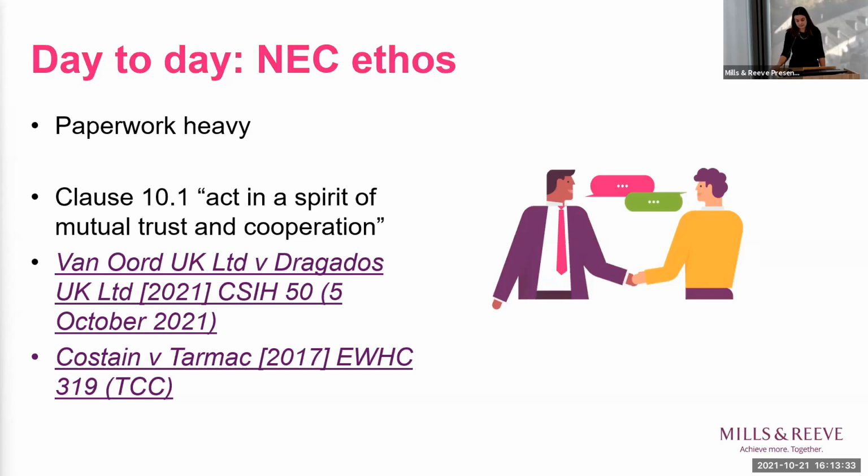they've actually read clause 10.1 as being interconnected with whether Dragados could claim to reduce the rates that Van Ord were being paid. And the court said, "We conclude that clauses 10.1 and 63.10 are counterparts. Unless Dragados fulfills its duty to act in a spirit of mutual trust and cooperation, it cannot seek a reduction in the prices. Accordingly, Van Ord has pled a relevant case to go to proof. Evidence can be led to evaluate Dragados's conduct. Did it act in a spirit of mutual trust and cooperation or not?"